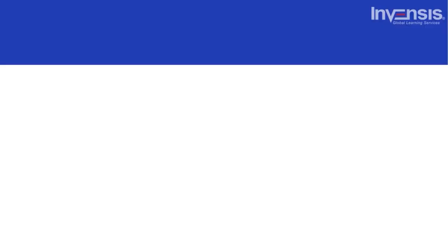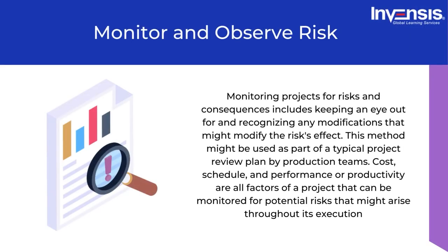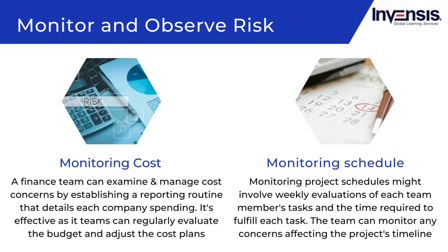The fifth risk mitigation strategy is monitor and observe. Monitoring projects for risks includes keeping an eye out for any modifications that might change the risk's effect. This method can be used as part of a typical project review plan. Cost, schedule, and performance or productivity are all factors that can be monitored for potential risks throughout project execution.